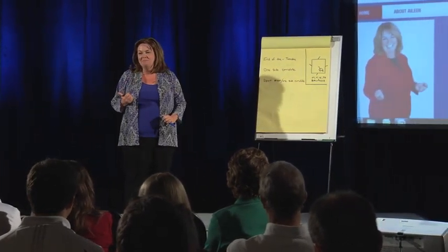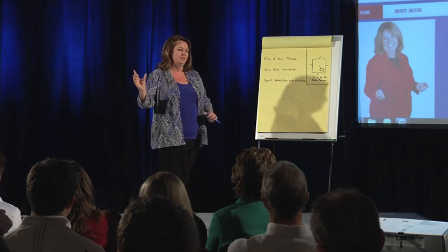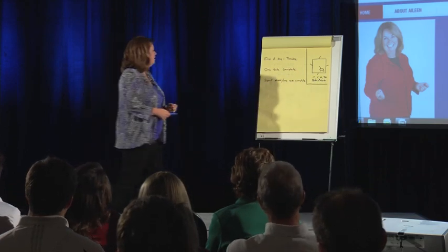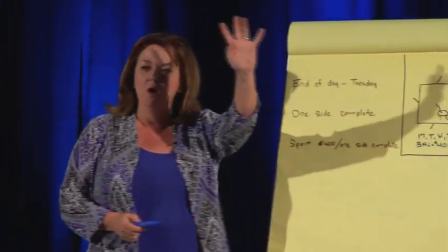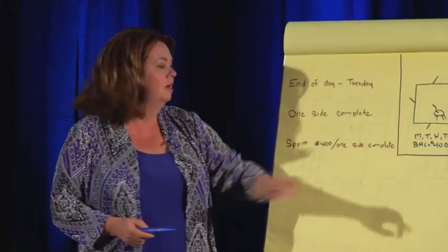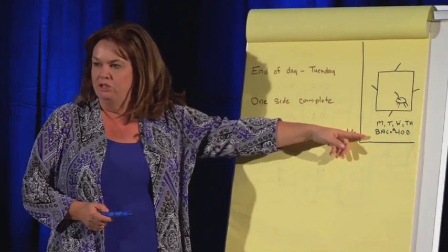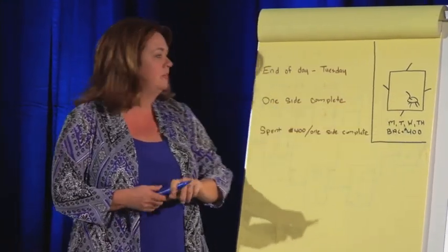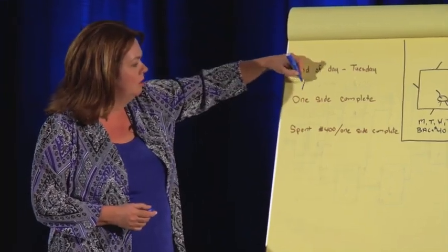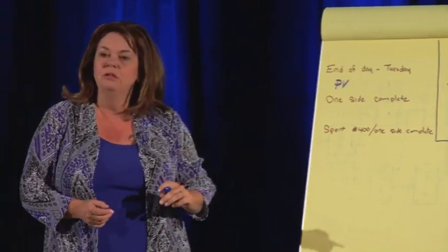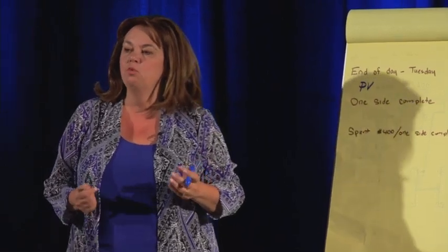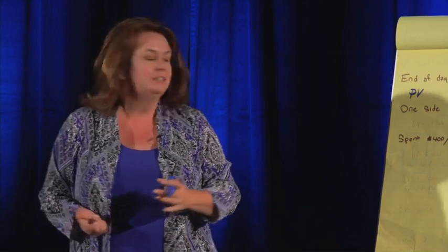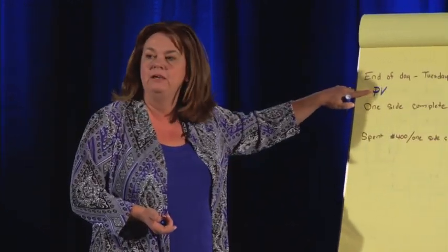But on the exam, really bad isn't going to be one of the choices. So we need to be a little more specific. In earned value, there are 4 critical terms. The first critical term is our budget. That was given in the problem statement. The next critical term we call planned value. It's a measure of how much work should be complete as of today. Sometimes we abbreviate it PV.